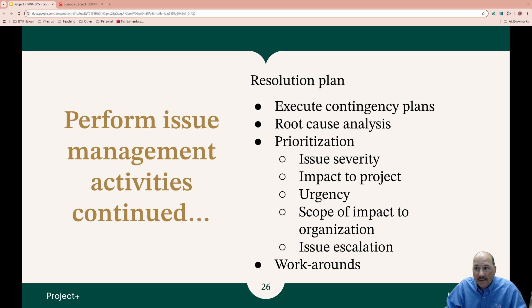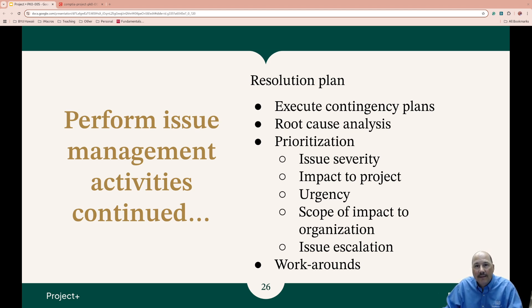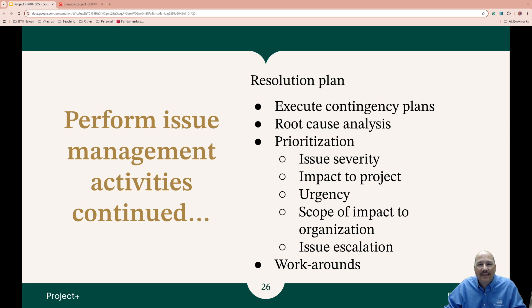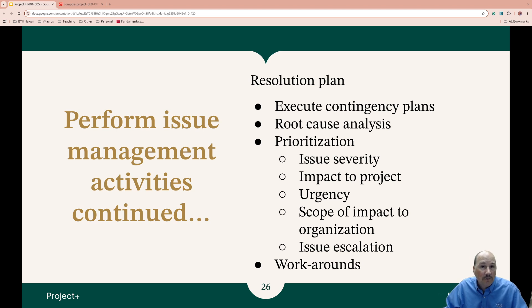There might be predefined contingencies that are activated with certain issues. If you don't fully understand what happened, you should probably do a root cause analysis, if time allows. Root cause analysis can be as simple as asking the five whys — asking 'why did this happen?' repeatedly to get as deep as possible and solve the root of the problem so it doesn't happen again. There's also the fishbone diagram that can be used for this. Root cause analysis is its own specialty training.